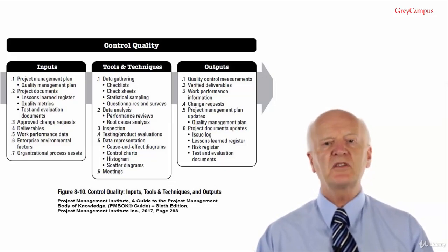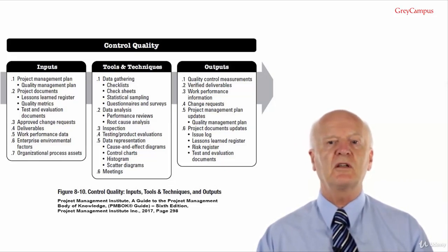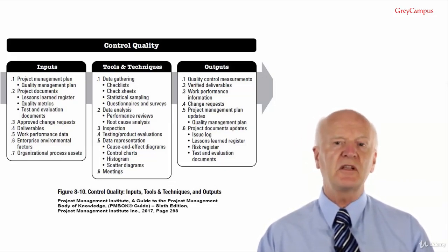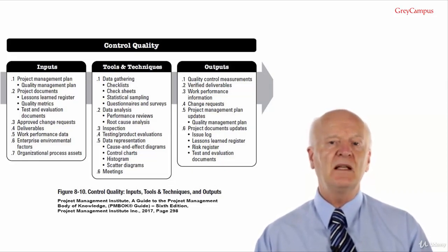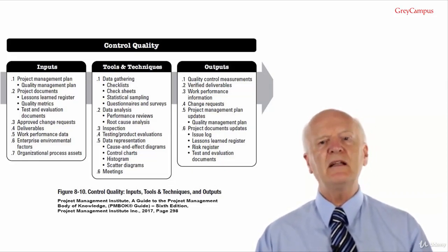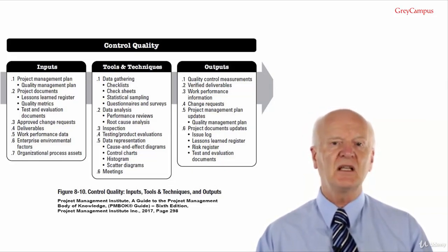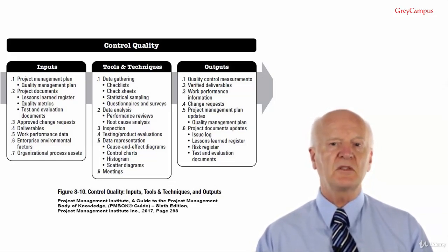Histograms. These are bar charts that can show the number of defects by source or component. The Pareto chart is the most common way for determining the 20% of the sources which cause 80% of the problems. It is based on the 80-20 rule. Scatter diagrams. They show planned variance on one axis and the actual performance on the second axis to see at a glance the overall state of the product performance.